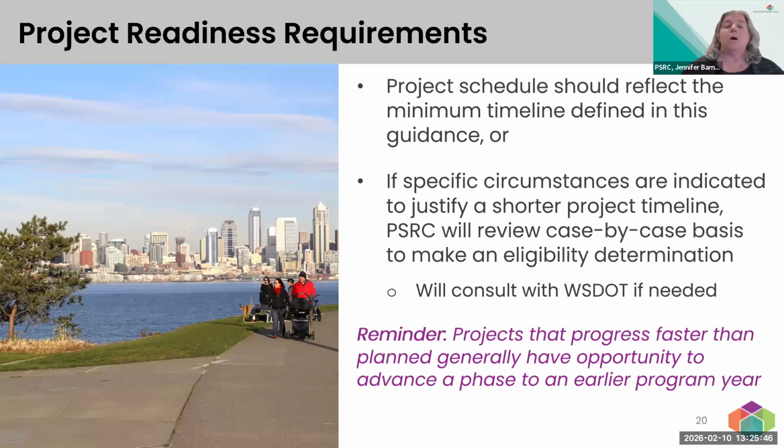Yes. So we're asking you to use this flow chart as your starting point. If a project is on a tighter timeline than our guidelines indicate, that isn't a deal breaker in and of itself, but we do want to hear the specific circumstances that would justify a shorter project timeline. So we review those. The first thing we check is if the project's schedule meets our minimum timeline guidelines; then we don't really question it further.